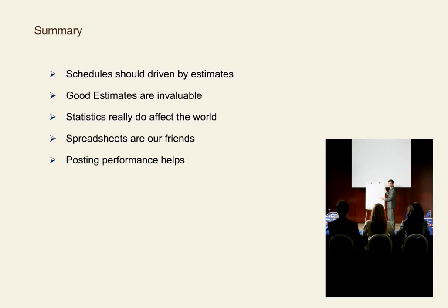The simple table showing the completion categories of most likely, expected, and high for the various activities in the project is a wonderful graphic for the project manager to have posted where the team members can see it. It gives a quick visual indicator of how well the team is doing relative to their original estimates.